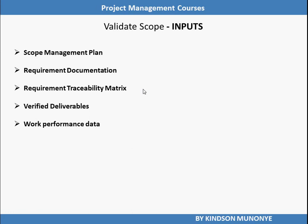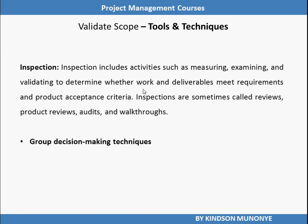Let's take a look at the tools and techniques of Validate Scope. There are just two tools and techniques. The first one is Inspection. Inspection includes activities such as measuring, examining, and validating to determine whether work and deliverables meet requirements and product acceptance criteria. Inspections are sometimes called reviews, product reviews, audits, and walk-throughs. Another tool and technique used for Validate Scope is Group Decision Making Techniques. These techniques are used to reach conclusions when the validation is performed by the project team and other stakeholders.